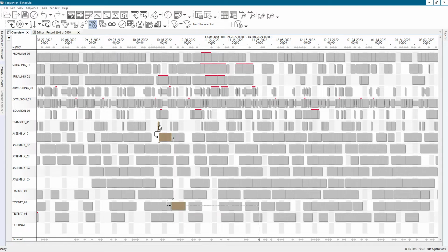You can play with these two options, adding Shift. If you add Shift with the right directional key, you are highlighting all subsequent operations. Just the right directional key plus left clicking, you are highlighting only the immediate subsequent operations. And that is the same for the left key. Left key plus Shift is going to highlight all previous operations.